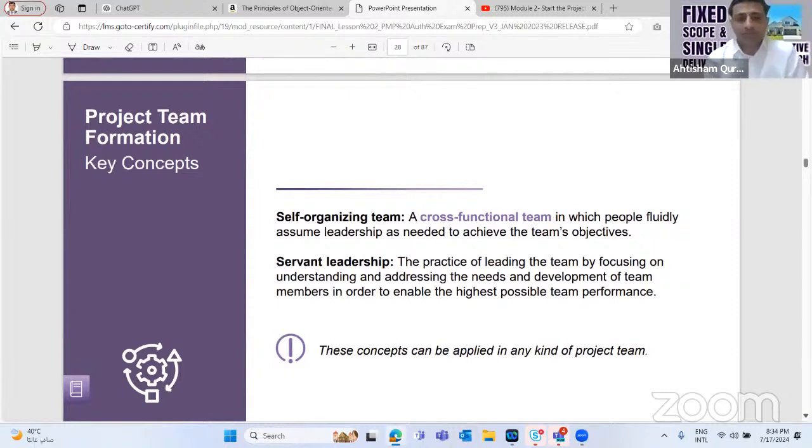Remember, in agile projects, we always emphasize that it's always a shared goal. It's not an individual goal, and the scope of work that we agree on is agreed as a group. So we organize ourselves. Each one of us will come to the table and take the work that he or she can do from the team backlog. But the team backlog is the responsibility of every one of us. It's not a single person's responsibility.